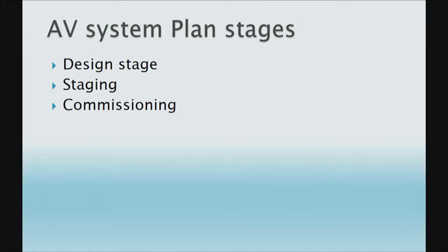So your design stage, your staging stage, if you want to call it that, and your commissioning are three areas I want to concentrate on today. I think everybody can relate to the design stage and the final commissioning. But in between is staging, which varies depending on whether you're an AV integrator with all the stuff at your shop, getting it ready to bring to the site, or you're doing your work in-house. It's putting together the mock-ups in the workshop, checking things out. A little bit later we'll talk about that, and it's a good time to catch some of those problem areas before things go awry. So keep in mind those three stages as we're talking about this.